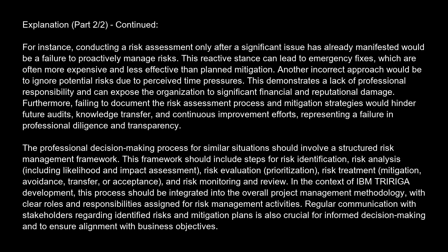Furthermore, failing to document the risk assessment process and mitigation strategies would hinder future audits, knowledge transfer, and continuous improvement efforts, representing a failure in professional diligence and transparency. The professional decision-making process for similar situations should involve a structured risk management framework. This framework should include steps for risk identification, risk analysis, including likelihood and impact assessment, risk evaluation, prioritization, risk treatment, mitigation, avoidance, transfer, or acceptance, and risk monitoring and review.